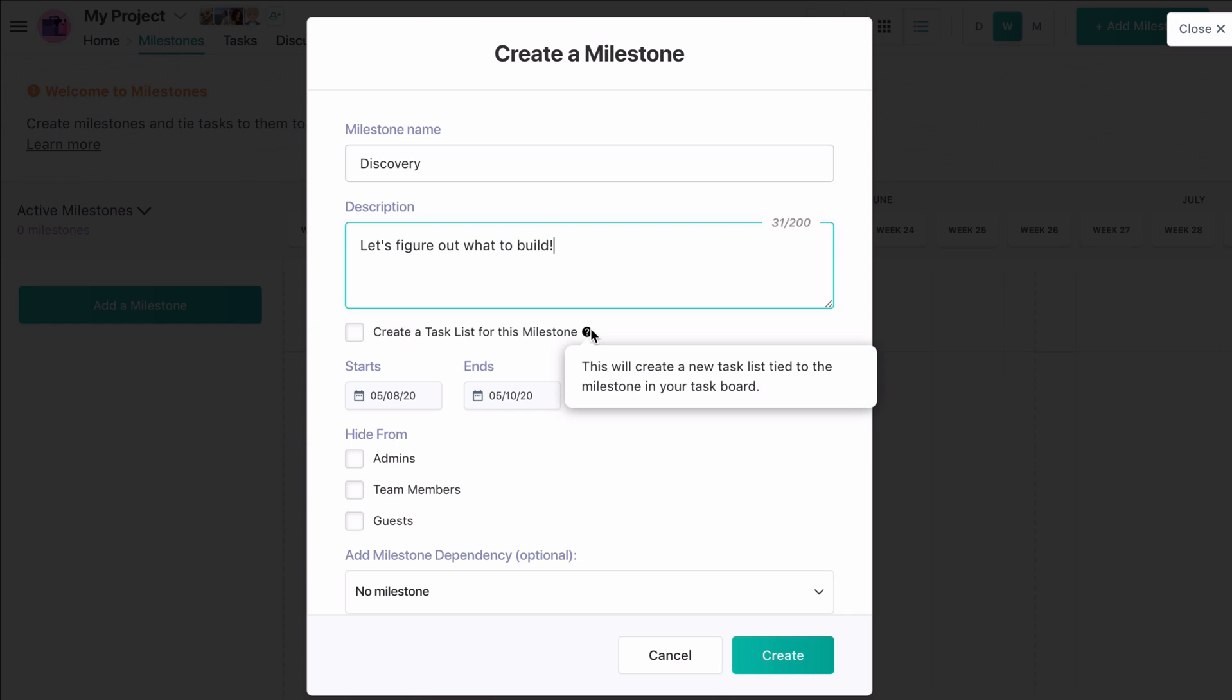If we decide not to do so, tasks created in this milestone will automatically populate in the furthest left list of our task board. I'm going to create a milestone list.